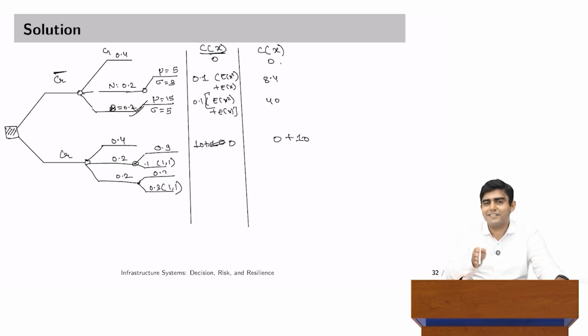There is no going back. You have taken a decision, you have to pay for resource mobilization, doesn't matter whether those resources are getting used or not. You might have purchased extra machinery, you might have procured extra laborers, and you might have entered into secondary contracts. Being a contractor, you can also subcontract some of the work as the tender or the agreement documents allow, but here the cost has been incurred. Doesn't matter whether weather is good, bad or ugly now.